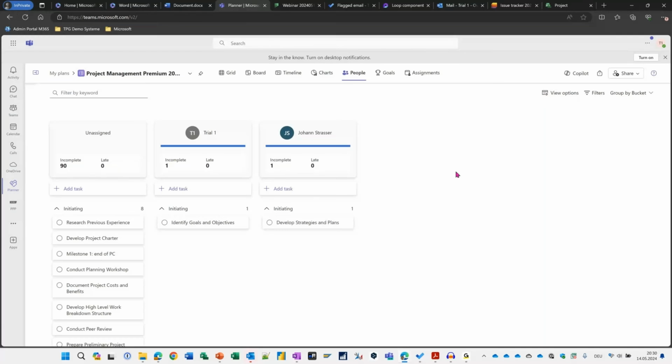That's basically what you can do with the people view in here. So the people view is the view from a single project. And if I now go into, let's say, what has been assigned and what else is maybe interesting in here, I could see the number of working hours that comes from the project schedule or the number of tasks. Unfortunately, this is not enough for any resource management activity. Why not? I can look at the hours here, but I don't see on a timeline if this works out from a capacity point of view. Do they have enough capacity to work on that in the time frame of these activities?